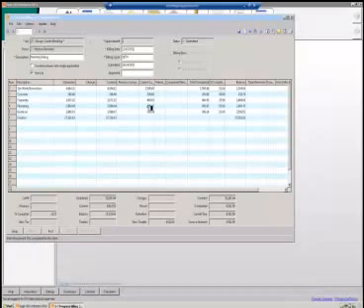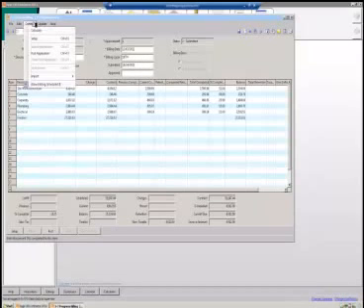Once this is done, we can then produce the billing. The nice part about this is the cycle that you would run through. You would click this button to submit that application so we know we've done it. We send it to the owner and we're waiting for their approval. Once he or she approves it, I can post that application to my general ledger and accounts receivable. And then once this is posted, this will turn black and it says create next application.